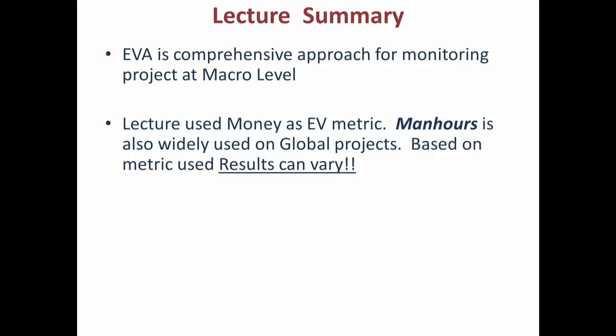The core is that it is based on actual work done — not on money spent or things like that. In this lecture, money was used as the metric, so the unit of earned value is the money unit. In many places, man-hours is used because man-hours tends to be the major component of cost in many global projects.